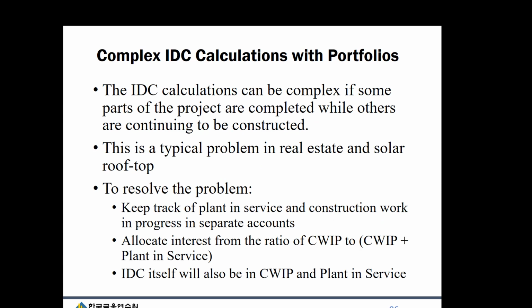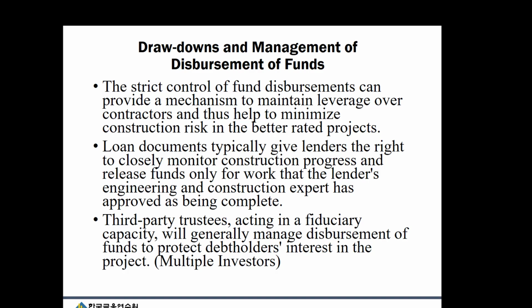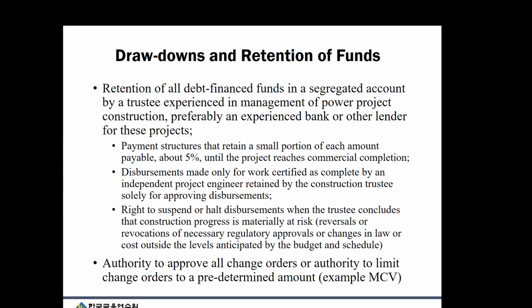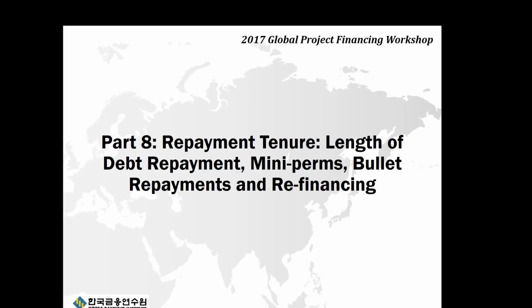Okay, and then if you have rooftop solar or you have real estate, this IDC can be an enormous pain. Okay, and then this was a little one on retaining funds. So if you pay your liquidated damages, you want to hold some money back, don't you? Because otherwise, if they got the money, they're not going to give it to you. They're going to do all sorts of things to stop you.